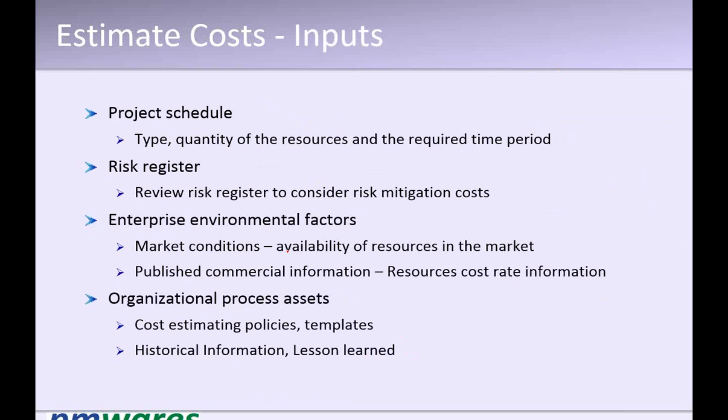The control is less. You can find other options, like instead of buying, you can take it on hire, or share with some people. So optimization is possible in capital expenditure also, but normally when we talk about optimizing cost, we are talking about variable cost.